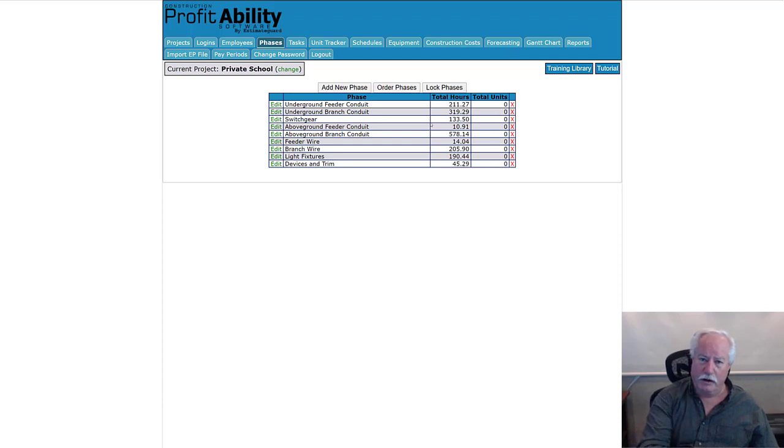You ask them to work on the first thing on the list until it's complete, and then you have them move on to the next thing. If there's a problem with the first thing on the list, material's not there or the tool's not there, then you jump to the second thing on the list until the material is there, and then you go back to the first thing. You work on things in order.